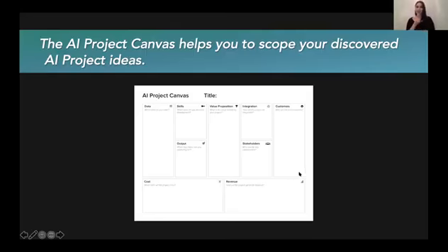It's very important to think right from the beginning about who will actually use the product in the end. Then another topic I see that is often overlooked in the beginning is how would we integrate it, right? Do we have a microservice architecture where we could just deploy our model? Do we have to integrate it into a certain existing software stack? Because all of these, the integration at the end, basically decide on how you approach the problem and the solution.